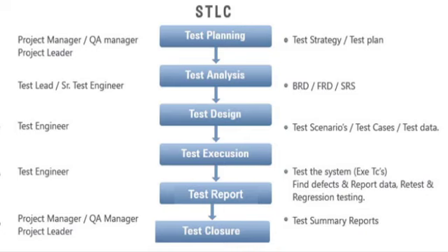After that, in level 1, testers will do the real testing by executing all the scenarios and test cases. Here come all varieties of testing like functional testing, non-functional testing, load, stress, etc. If they find any deviation, they will raise a bug in some issue tracking tool, or they will make a bug report manually. Nowadays, all companies are using some tracking tools.